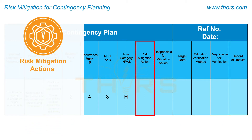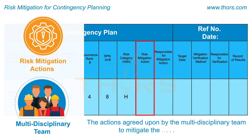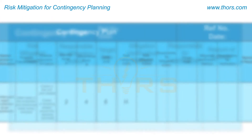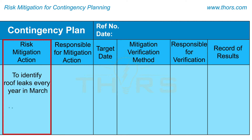In the risk mitigation action column, the actions agreed upon by the multidisciplinary team to mitigate the risks are entered. For the leaking roof example, the risk mitigation actions are identified as: to identify roof leaks every year in March, and to fix the roof leaks or replace roof panels.